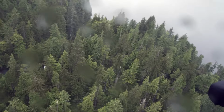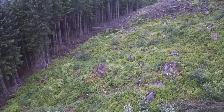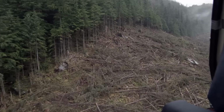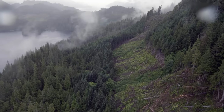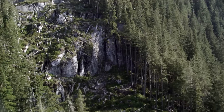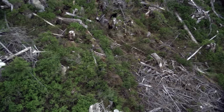Another way to understand the planning challenge is to consider what has to happen at each and every one of the 243 pole sites, remembering that everything that goes in and out does so by helicopter only, flying from barge camps. A year or so earlier, the route itself had been cleared in a 100-foot wide swath that ran from Swan Lake in the south, north to the Tyee substation. Trees that were not taken were left where they fell.